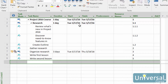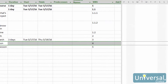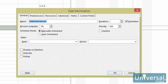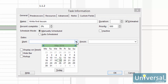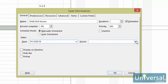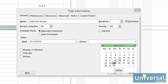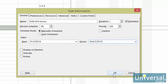To set a start date, double click on the task name. In the Task Information dialog box, click on the General tab if it's not already selected. In the date section, select the start and finish dates. Then click OK.